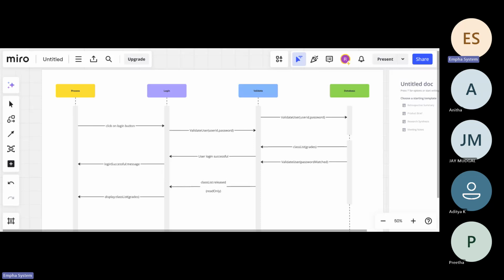Requirement analysis means you need to analyze whatever requirement the client is sharing first. You need to analyze whether those requirements are realistic or not. You need to check whether they are implementable or developable or not. That is the first thing. Second thing, you need to analyze whether it is as per my work scope or not. Yes, that is your activity.